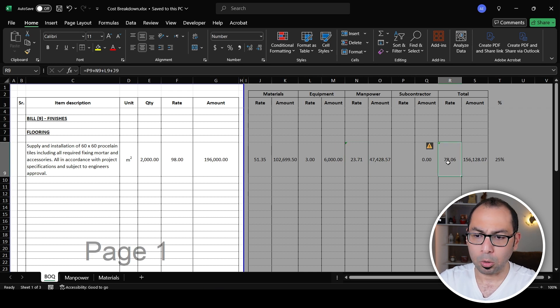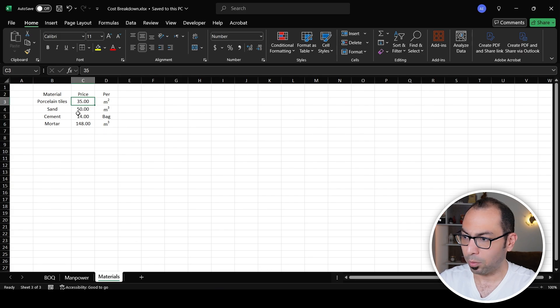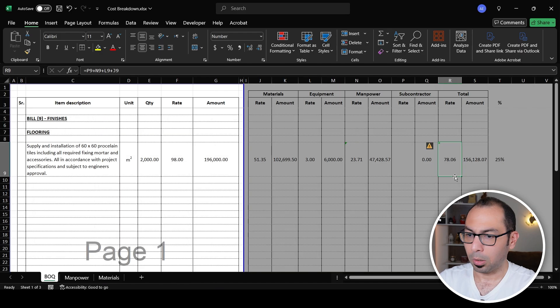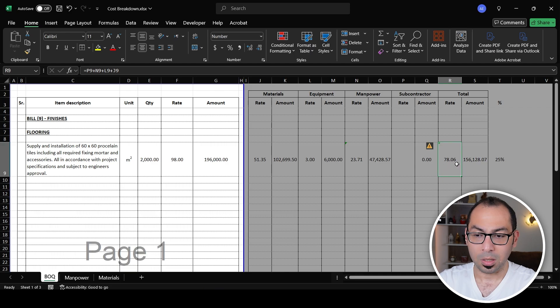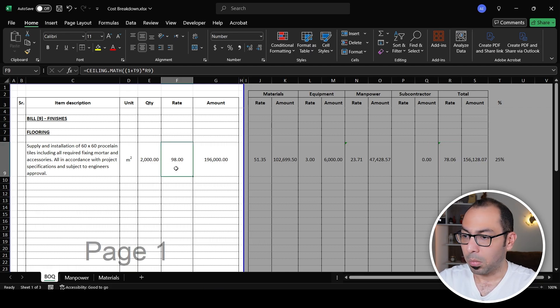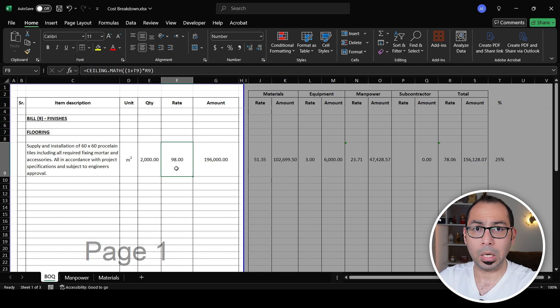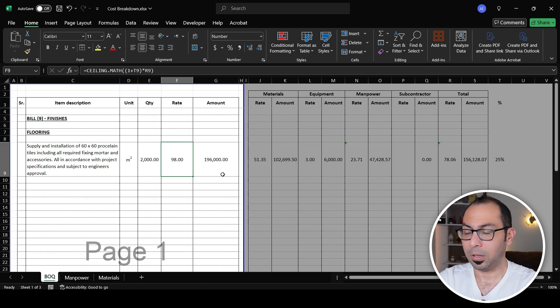So in summary, I'm getting a total cost rate of 78. The tile supply alone is 35, but including installation, wastage, and all required materials the cost is 78. Adding 25% markup, the ceiling price for this item comes out to 98 in the BOQ. This is how you analyze the rate — the same concept applies to all items in the BOQ. In another video linked here I explain the same concept theoretically. Thank you for watching and I'll see you in the next one.